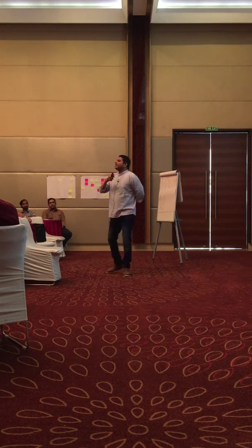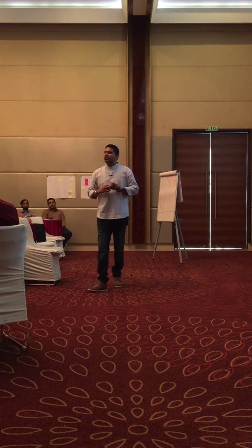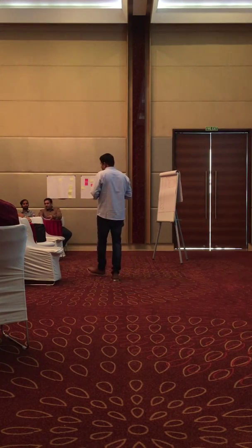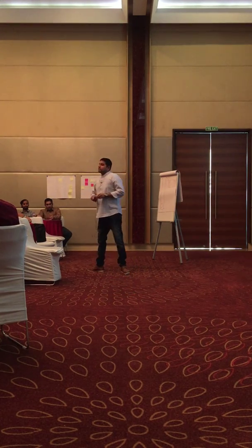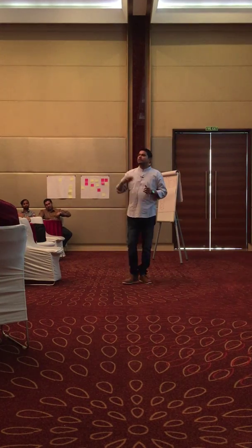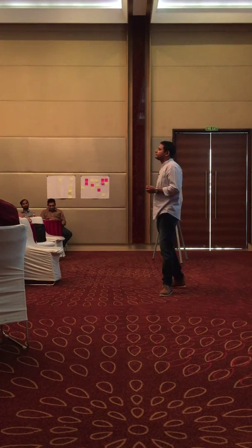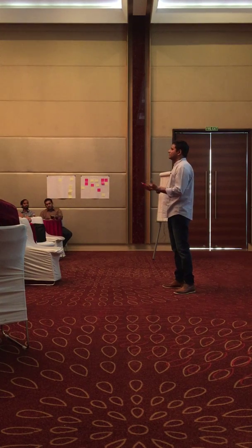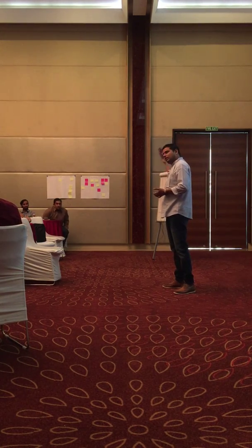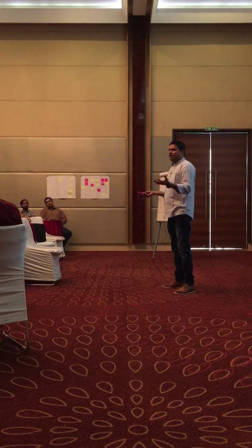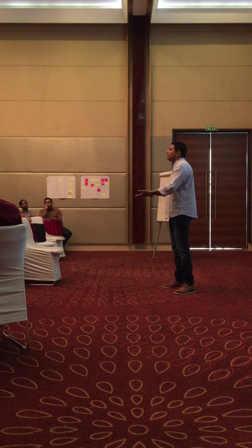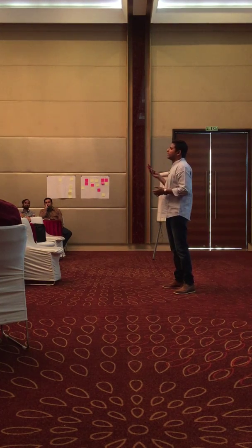Excellent. Technical dependency. For example, you have two stories. One is login, the other is registration. The customer, the product owner, comes to you and says, I want to deliver the login first in the sprint, and registration maybe in the third sprint. So what is the impact? Without registration, you may have to do some kind of hard coding, or create the user IDs offline. So many things, right? That kind of dependencies and technical constraints, you can discuss with the product owner. You can provide alternative solutions, all those things for prioritization.